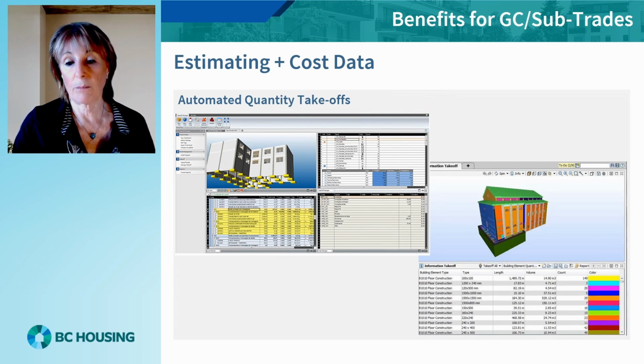Cost data can be included into the model dataset to help understand the project's total cost more effectively. With BIM, costs can be automatically calculated based on material, labor, and other resources associated with the model elements. This saves time, optimizes resource allocation, and reduces cost overruns.